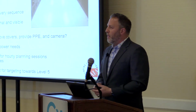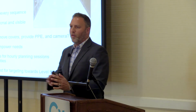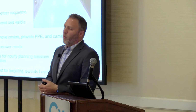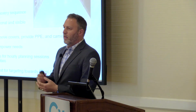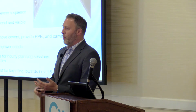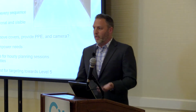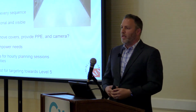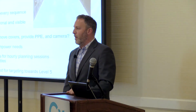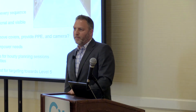Give percent complete on your level 4s to show progression, to show that you're moving forward and that you're not falling behind. It's quite important that your scheduling tool be Microsoft Project or Primavera or one of these applications. Don't try to just do something in Excel unless you're really good at Excel and you can provide updates. But if things shift, you need to have the flexibility to move your resources around and show that you still have the appropriate manpower to do that work.